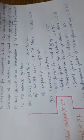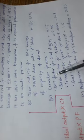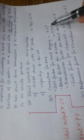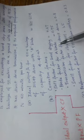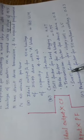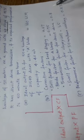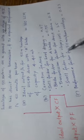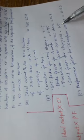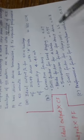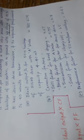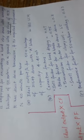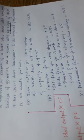Equipment and all. Then you have the correction factors: soil factor for hard digging is 0.67, blade factor for A is 0.75, transmission factor for direct drive is 0.8, swelling factor for clay soil is 1.5, performance factor for 50 minutes per hour is given as 0.83 or 83 percent.